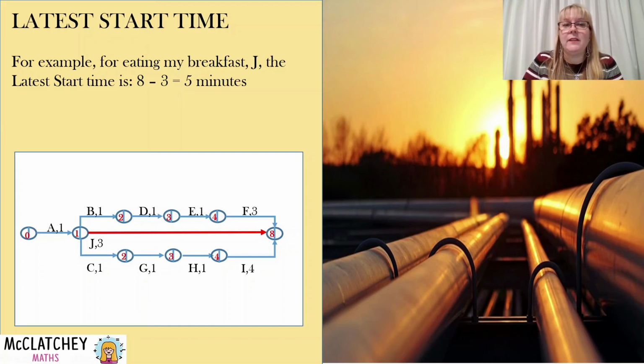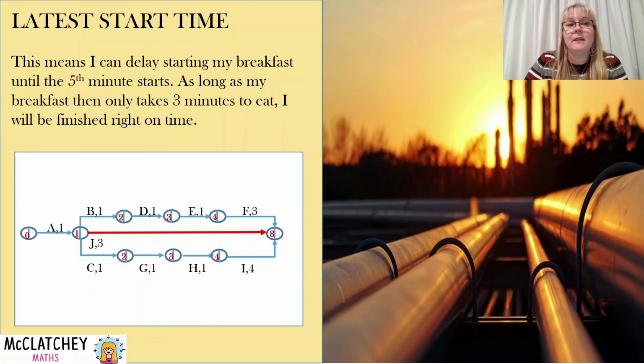The latest I could start that is at the 8 minutes, take away the length of time that it takes to do the activity, the 3 minutes. So I could actually, instead of starting that at the 3 minute mark, delay that all the way to the 5th minute and then start it right at the very last chance that I've got, go hard and eat that breakfast for 3 minutes, and then I'm done by the 8 minute mark. So the latest I can start eating breakfast is at the 5 minute mark.